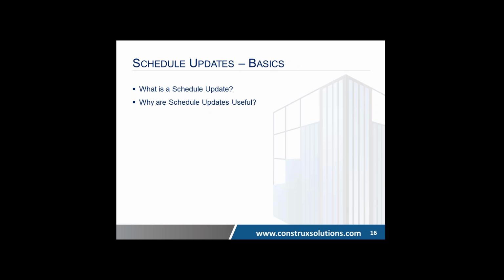One of the other questions I have here is, how do we know which activities are driving the project? Well, first of all, driving means there's two ways to be driving. Now, driving the project, that sounds to me like you're talking about the critical path, driving the end date of the project. That's the critical path. Those are things with zero float. Those are things that are generally red in your schedule.